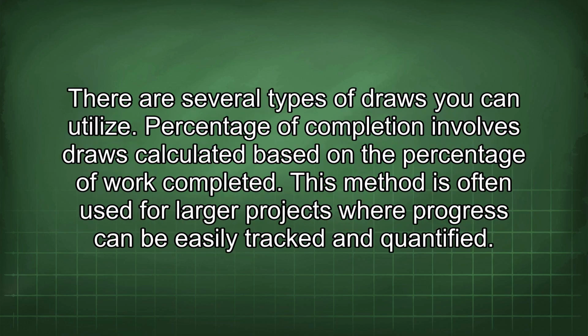There are several types of draws you can utilize. Percentage of completion involves draws calculated based on the percentage of work completed. This method is often used for larger projects where progress can be easily tracked and quantified.